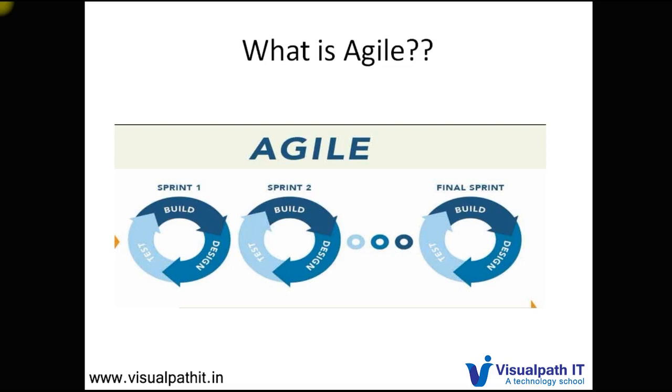Instead of making a complete product in one go, as we do in the waterfall model, it will be divided into sprints of 2 weeks to 4 weeks, and these particular requirements will be developed and the working software given to the client. Okay, let's go into more detail.